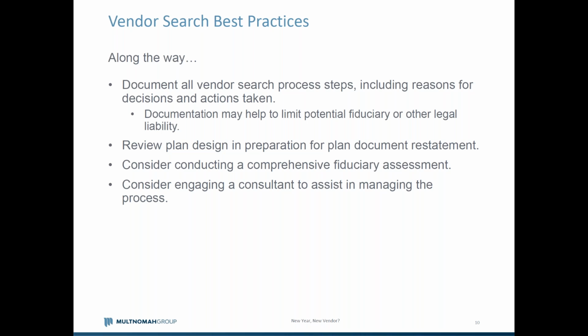A couple of other best practices to consider. One is reviewing the plan design prior to starting this. If you're using a vendor-provided plan document, it's important to understand what, if any, challenges changing vendors may present to you. If you understand what kind of non-standard features are in your plan document, you can make a decision of whether that's a priority that the new vendor needs to be able to support, or if there's flexibility in your mind as to whether you can make changes to fit into a new vendor's plan document template. Knowing that beforehand is important.